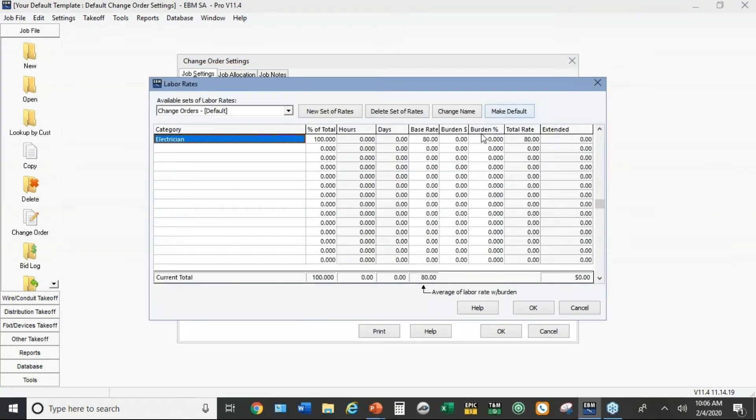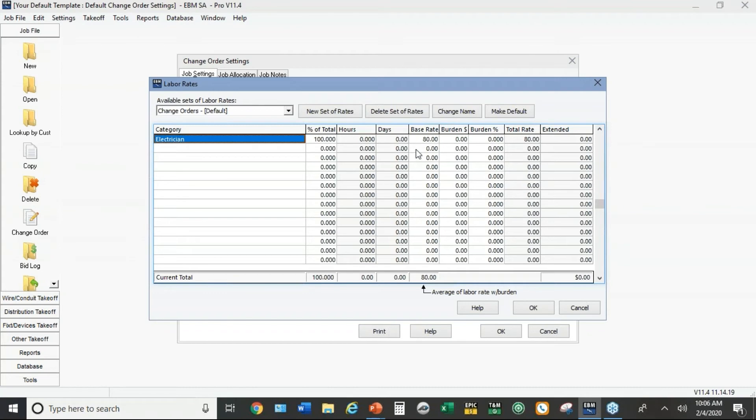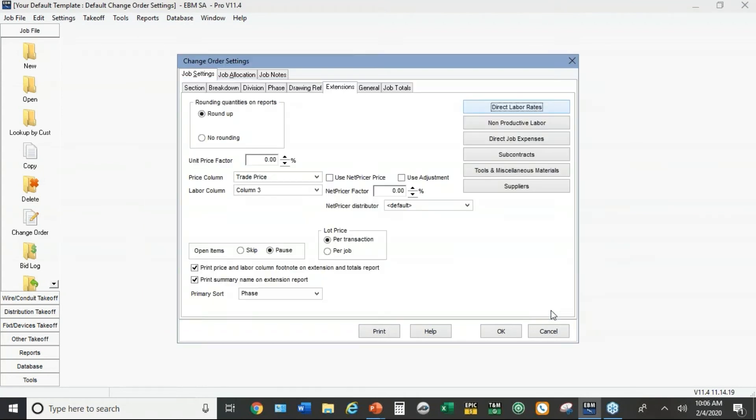Same thing on direct labor rates. Typically customers will have a different hourly rate for change orders than they do for bidding jobs. The change orders is more about what you can charge, what you can justify, rather than your actual cost. So these templates are kind of a way of going somewhere in between.